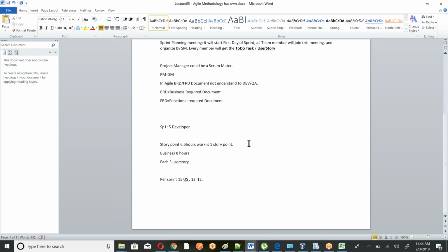Suppose another person's user stories are each 3 points. That means that person is getting less work, even though he has more user stories, because his work totals 9 points. Right? So at that time he can take that other guy's one. Okay, before doing work, we have to think how many days it is going to take and how many points there are. They don't count hours. They count the points in this sprint. That's why, and the point is split from the 6.5 hours.